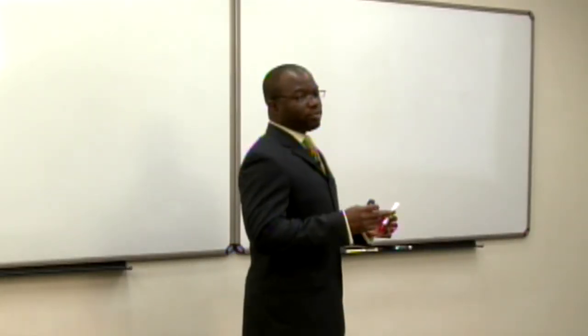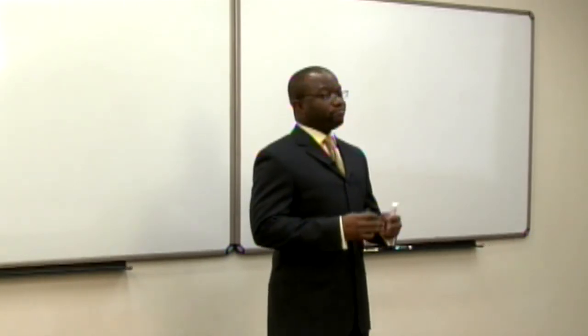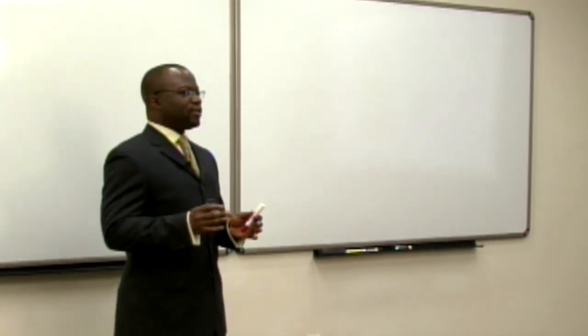Reasons for authorizing a project. Why would you authorize a project? I was actually training a class a few weeks ago, and one of the reasons that someone came up with for authorizing a project was availability of budget or availability of cash. I mean, that's ridiculous. In the world of the PMI, you do not authorize a project just because you have money to do it. So if you're ever taking a test and you come across a question, which of the following are reasons for authorizing a project, and you've got cash, revenue, not the right answer in the PMI world.